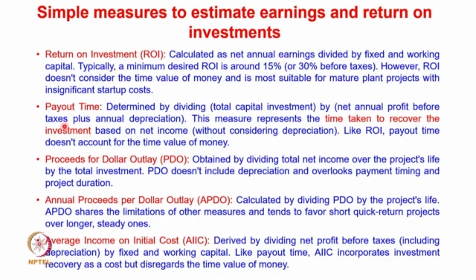Okay, so the next definition here is payout time. This is determined by dividing total capital investment by net annual profit before taxes plus annual depreciation. So we sum up the net annual profit before taxes and the annual depreciation, and if we divide the total capital investment by this sum, that gives us the payout time. So what is payout time? Payout time basically represents the time taken to recover the investment based on the net income.